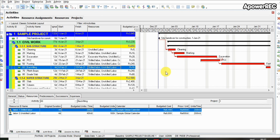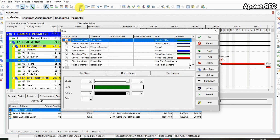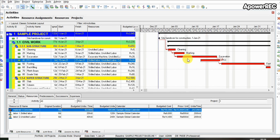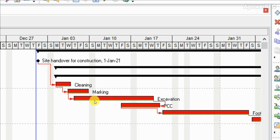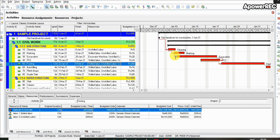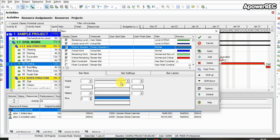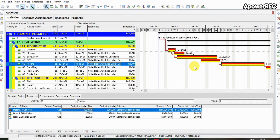To reflect the baseline on screen, right-click on the Gantt chart and click on Bars. A dialog box will open — select Primary Baseline. Many formatting options are available here. Once you click OK, you can see the baseline has been assigned to the project. The small yellow lines represent the baseline schedule — a fixed schedule that will not change or shift when you update activities. To make it more visible, I am increasing the width of the baseline schedule bars. Now the yellow boxes clearly represent the baseline schedule.